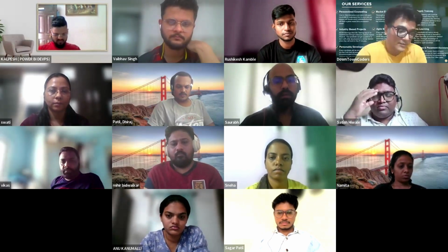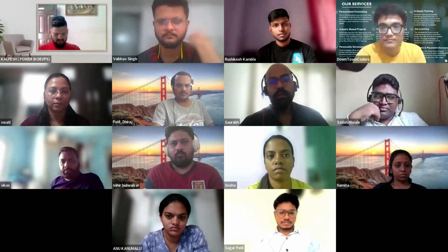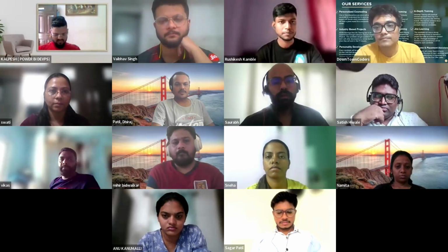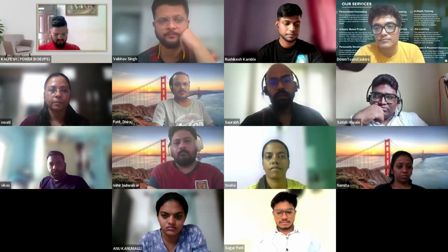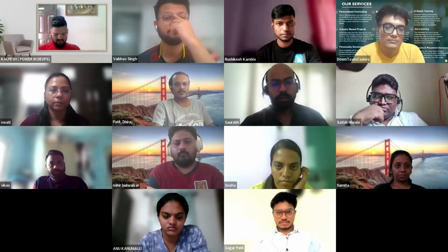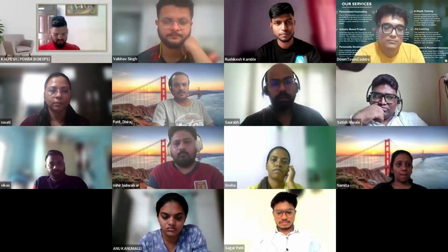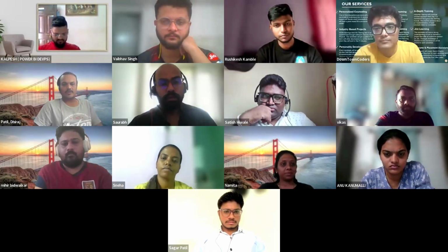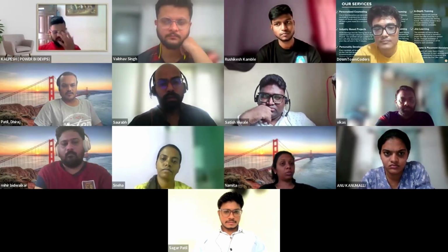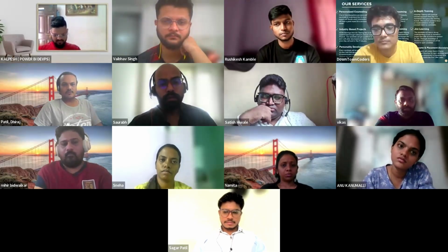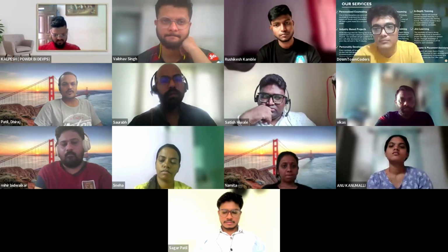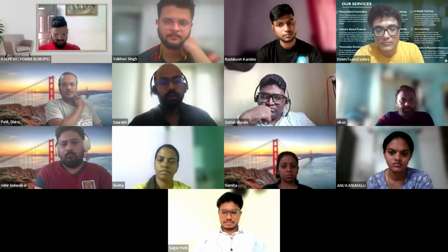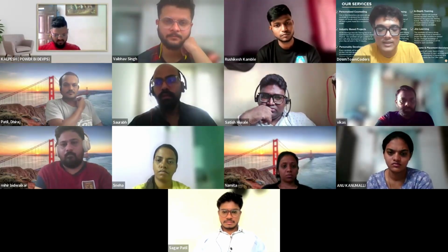So basically, one story point is 1 day or 8 hours, as you are saying. But as you said, the key developer can give the actual answer that this story point is a 4-level complexity or 5-level complexity, and it can take more than 1 day or 2 days. So in those cases, the developer has to maintain a record with him that okay, if I have worked 15 story points during the month, there were 5-6 story points which were actually taking 2 days to complete, and then I can justify. The story point has to be increased then and there itself.